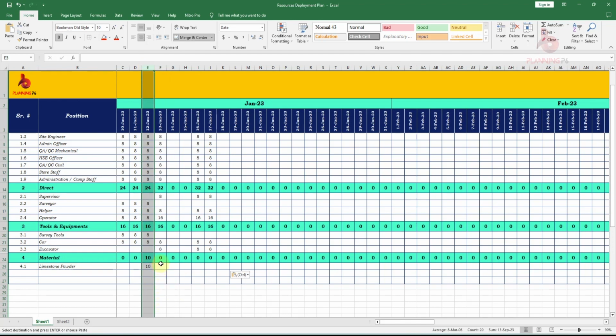By this way you can plan accordingly, or your administration department, because they don't understand what the histogram or S-curve is saying, how to prepare. In this way you can arrange your company top management, your administration, HR department, hire your resources according to this sheet, and also this is helpful for your client as well. And with the same way you can prepare for the cost, how much cost we required.